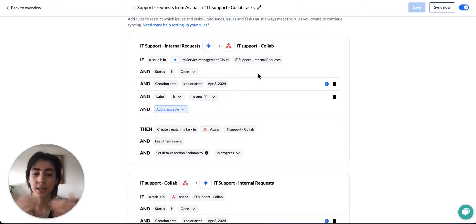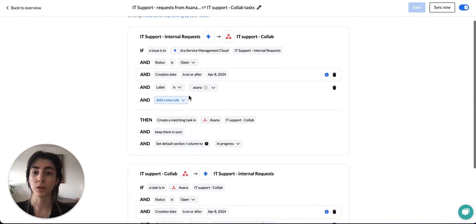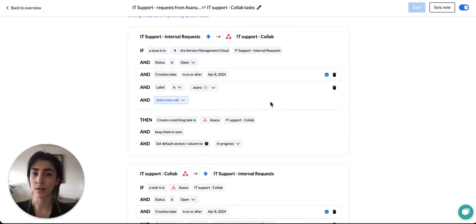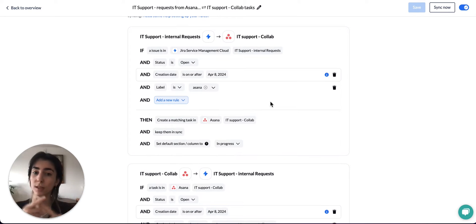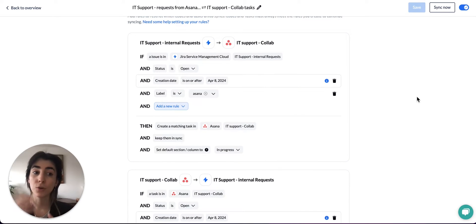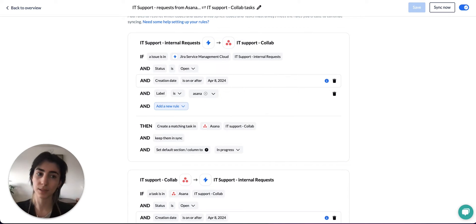So in my system, any closed issue or closed task is no longer synced. I also have a rule here to only sync the issues that have the label Asana. This means that any other issues within my Jira project will not be counted, only the ones with the label Asana. Therefore, you can always reduce your count by changing the rules to exclude more items.